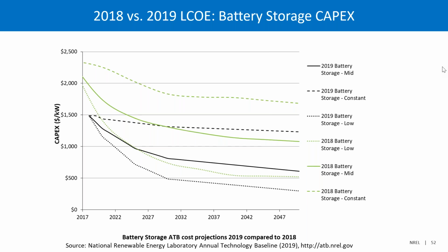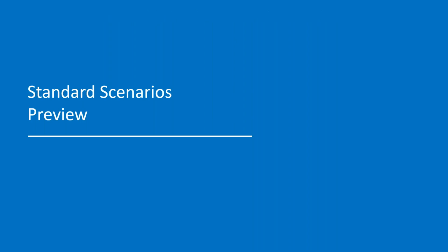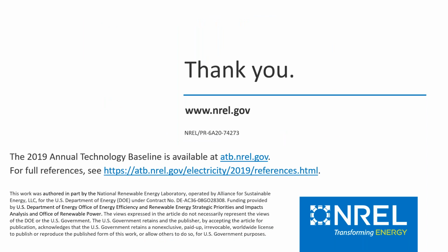So the bigger your site, typically the taller, but you can change that. But the tower construction method is the standard block addition method with concrete and reinforced steel. How sensitive? It is fairly sensitive once the height starts increasing significantly beyond 200 meters.